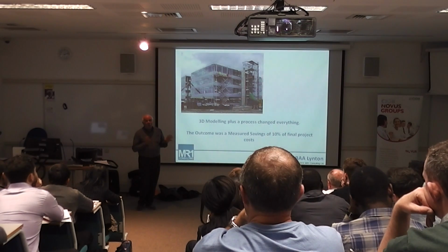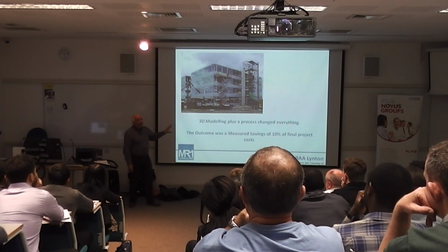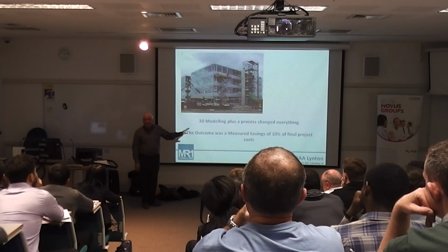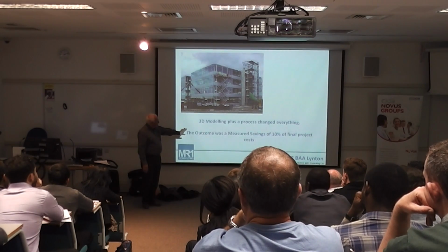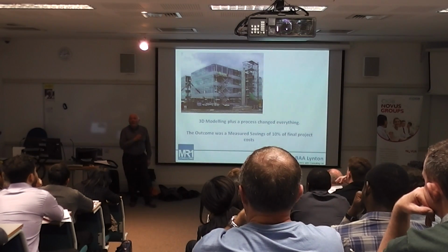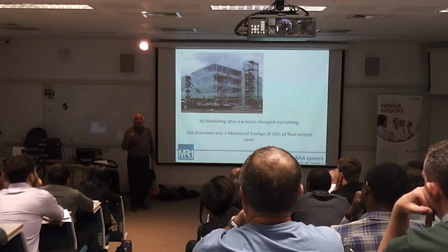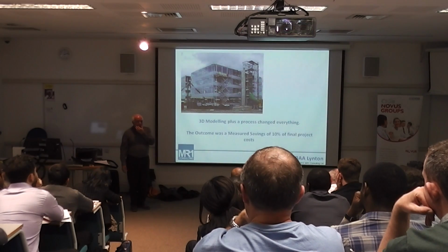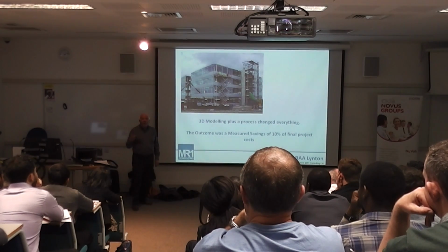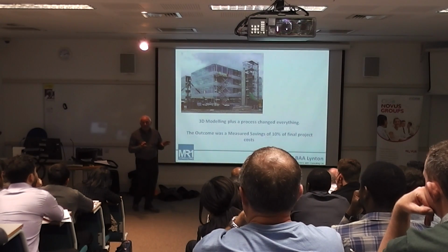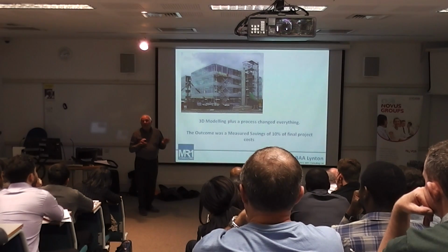So find new ways of working. And a team were put together to come up with a new way of working. And I was a member of that team. The outcome of what we did on Heathrow Express showed a saving measured by Anderson Consulting, an American company at the time, who were following what we were doing and measuring the results. They reckoned that we saved 20% as a minimum on the delivery of that project after the collapse.